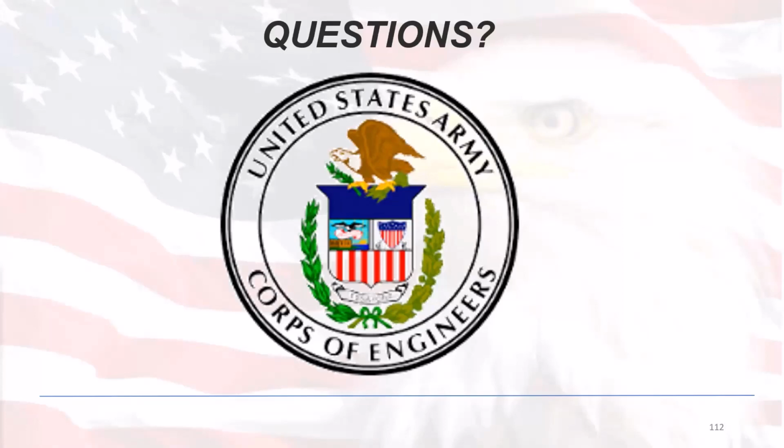Yep. So as long as they're not planning on doing another SDEF import, if that was the case, yeah, they can add it to RMS. And then it'll allow them to go in and utilize that data inside of the daily report. And then obviously if they complete that daily report, it's a snapshot of the data, right? So, but yeah, I highly recommend anything that comes from Primavera, make another change in Primavera, do another SDEF import.